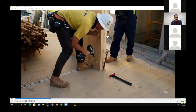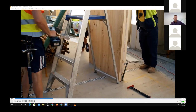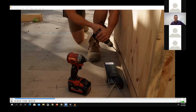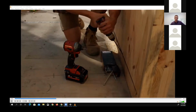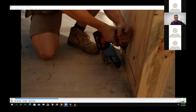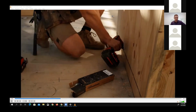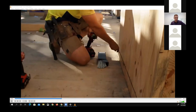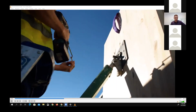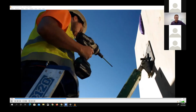Key consideration, as was mentioned by Callum, but also with all of the other consultants, was working in the ceiling heights and the ability really to bring that forward. And one of the big outcomes of working with CLT is it forces you, because of the offsite manufacturing aspects, and really you've basically got one shot at getting it right, to use the technology that we've got in BIM and whatnot to try and bring more control back to the designer as to how things are going to work spatially, and leaving a lot less up to the workers on site, which has been quite a benefit as we've come to install things now that we're fitting out and putting all the services through. The ceiling heights that Jordan and Callum and the other service consultant team worked out are actually playing out, and the guys on site are rolling through pretty quickly on the internals.